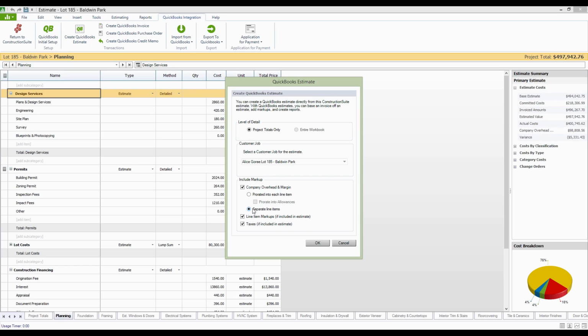I prefer the latter option because as a separate line item, I can always see that I'm making my profit on these jobs. If something individually goes over the original cost or the original estimated value for these, I'll immediately know it. I'm not trying to cushion or buffer the numbers or anything like that. I want raw numbers so that I want the estimated cost to go along with this so that I will know how accurate I am at estimating, or how accurate my estimators are, or whoever's doing this work.